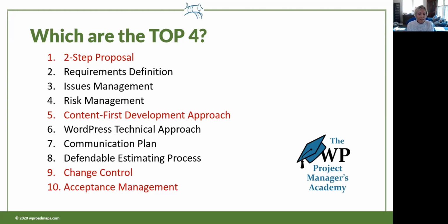So those are the 2 things I focus most on, because those are the 2 things most people are struggling with. And to control scope creep, you got to have a good change control process, and you got to invoke it every single time. I don't care how small that change is. I don't care if it's a change to the schedule or a change to the cost or just a change to the requirements that doesn't change either the time or cost. And sometimes that happens, especially when a requirement is eliminated. But all of that stuff needs to be analyzed as to its impact on the schedule.